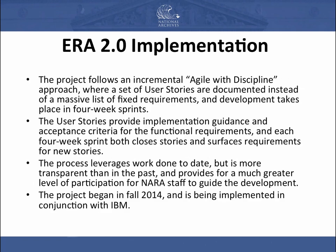One thing I want to mention about how we are doing this project differently is that this is an Agile project. We are using a flavor of Agile called Agile with Discipline — not Scrum or Kanban. We started with a set of use cases and developed user stories for all of our functionality. We are doing four-week sprints, starting in fall of 2014, so we're about two-thirds of the way through development. Each user story provides the implementation, acceptance criteria, and definition of done so we can write test cases. Since the end of the first sprint, we've had a working system that has grown iteratively. The work is being implemented by IBM as our partner, who also has responsibility for the current ERA system. We have about 40 contractors on the project.